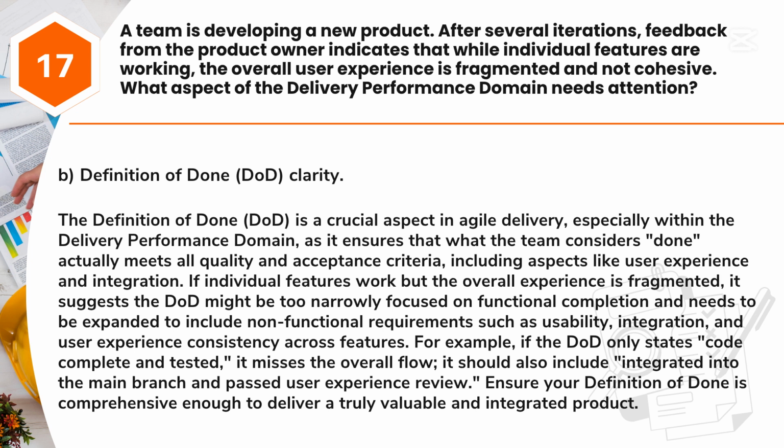on functional completion and needs to be expanded to include non-functional requirements such as usability, integration, and user experience consistency across features. For example, if the DoD only states, code complete and tested, it misses the overall flow. It should also include, integrated into the main branch and passed user experience review. Ensure your definition of done is comprehensive enough to deliver a truly valuable and integrated product.